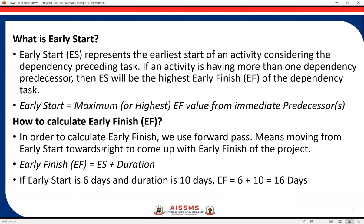Now, what is the early finish and how to calculate it? To calculate the early finish, we use the forward pass — moving from early start towards the right to come up with the early finish of the particular activity and then for the project. Early finish equals ES plus duration. So once we know the early start date plus the number of days the activity is going to take, we can find out the early finish. For example, if early start is day 6 and duration is 10 days, then early finish is 6 plus 10 equals 16 days — this activity can be finished at earliest by day 16.